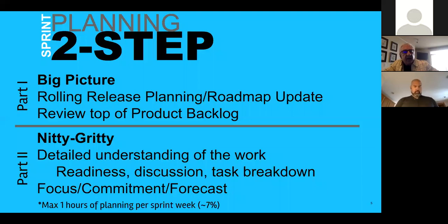As a guideline, you really wouldn't want to be spending more than an hour of planning for a week's worth of work for a team. And most teams that I work with usually do sprint planning for a 2-week sprint in an hour once they get going and they have everything working well.